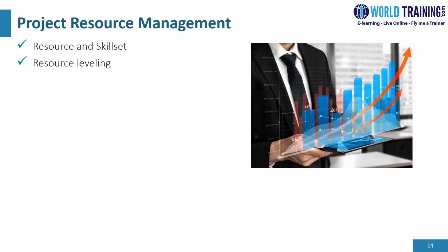And also AI system can look into not just your project management system, but also your HR or other systems where a resource may have a vacation approved for next month, but as a project manager, you may not be aware. So in that case, the AI system will look into your whole ERP system, and based on that, it can inform the project manager that we need to do resource leveling. And this is based on their availability and the calendars.